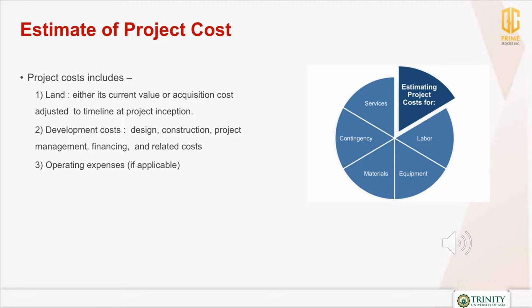Valuing land. Here, we use conventional appraisal approaches, usually the market data approach. Land value can also be estimated using a competitive market data approach, in which knowledgeable brokers are requested to provide market data about current prices and trends. After which, we have to apply corresponding adjustments considering the project timeline.